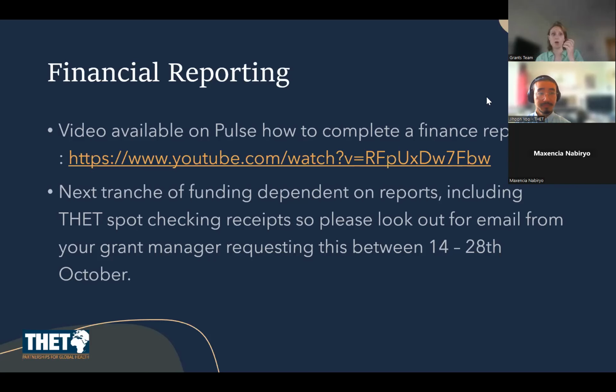Just in case anyone is unaware, I know Category Cs are just finalising the grant variation agreement. The tranches of funding in your grant agreement are almost always exactly the same as what is in your phased budget, the budget you submitted to us. We then say, okay, for Q1 they're going to spend 10 grand, so we'll transfer them that in advance, which is what you would have got at the beginning of the programme. That's how those tranches of funding are calculated.